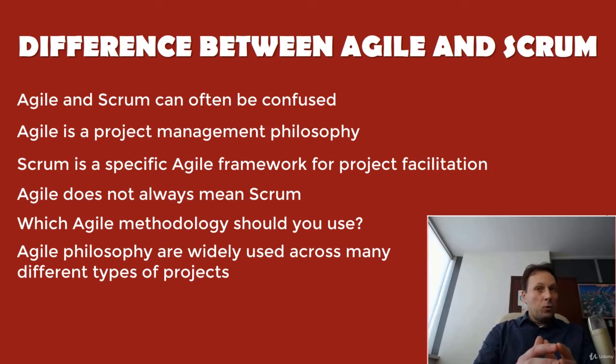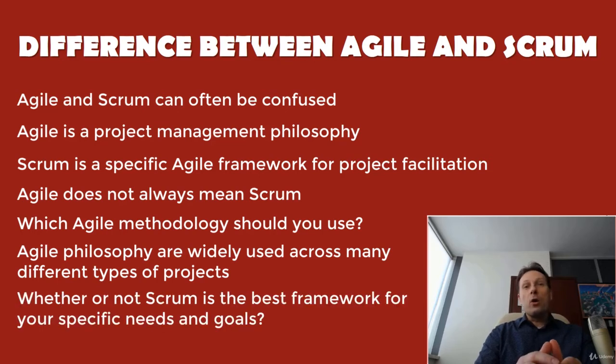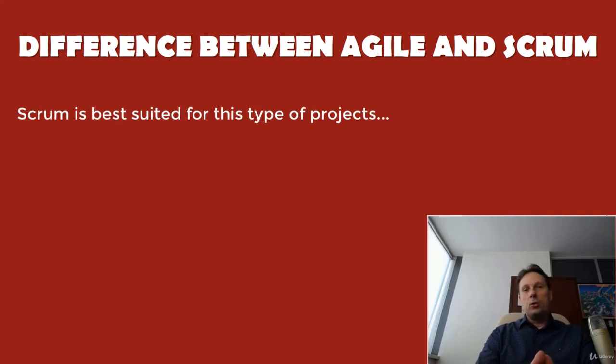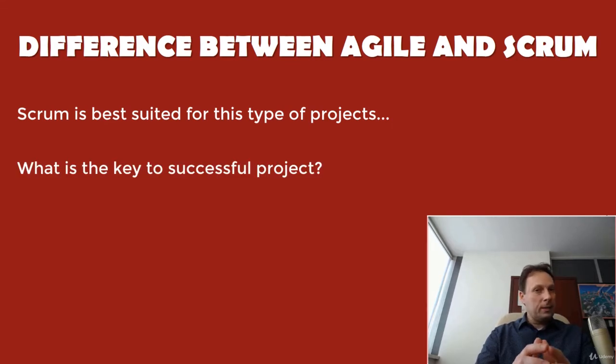If an Agile approach is right for your project, you will then need to determine whether or not Scrum is the best framework for your specific needs and goals. Scrum is typically best suited for projects which do not have clear requirements, are likely to experience change, and require frequent testing.